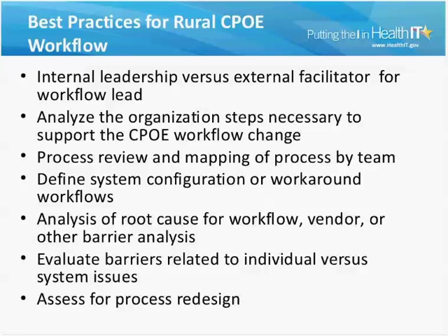Moving on, analyzing the organizational steps necessary to support the CPOE workflow change. Again, we want to do a gap analysis there. So where are we now? Where do we want to go? It may not be something we want to implement all in one fell swoop. It may be something we want to take in steps. So that gap analysis is very, very helpful.